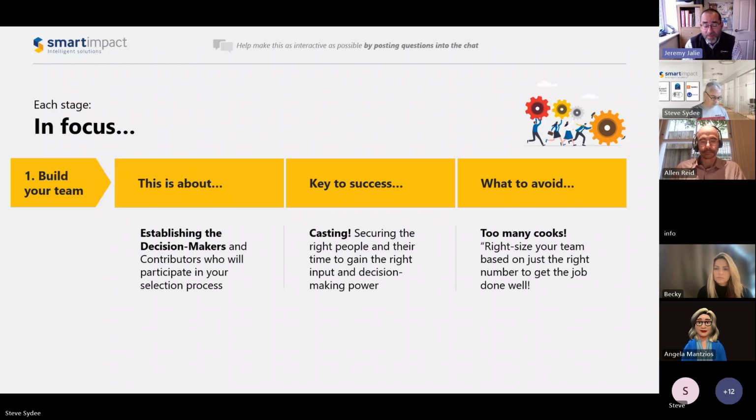Then to touch on what you described about getting the insights and requirements from end users, the person who's wearing that business analyst hat probably needs to go and identify subject matter experts within the business. Now, you could say we need to interact with everyone, but I think that's pretty impractical in most organizations. So you need to find someone in each department who can speak confidently and authoritatively about how business processes run and what the outcomes of those business processes are.